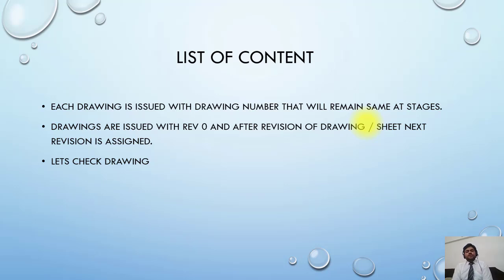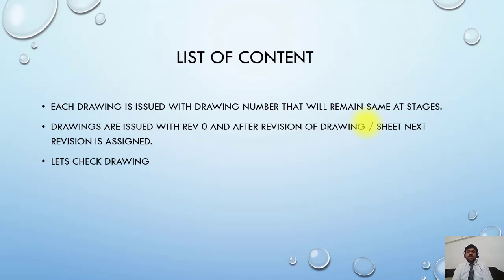Each drawing is issued with a drawing number that remains the same at all stages — it is like a constant. It stays the same from start to end, unless it is explicitly required by the client to change it, but that is not normal practice.